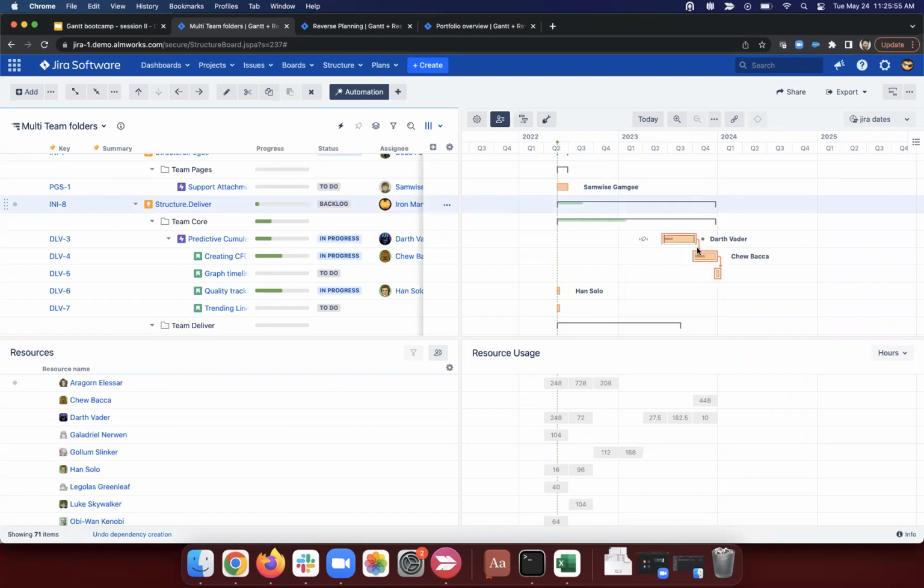When I link this, I've now created 3 items that are all in the critical path. As we can see, if any of these get delayed or if anything else gets linked to them, they immediately become part of the critical path. If I stretch an item, like adding to the scope, delaying this item is going to delay these items and push them further out. It's just the rightmost item in the chart, and anything directly linked to it we should always expect to be part of the critical path. I hope that makes sense.